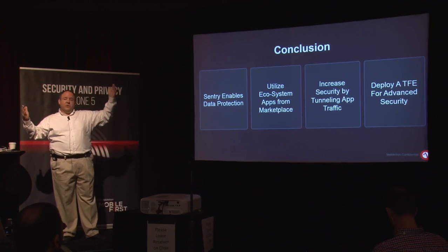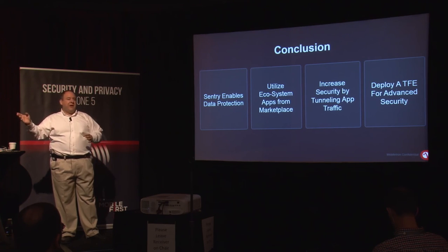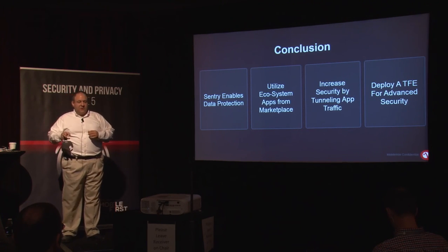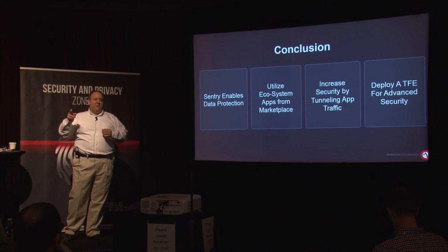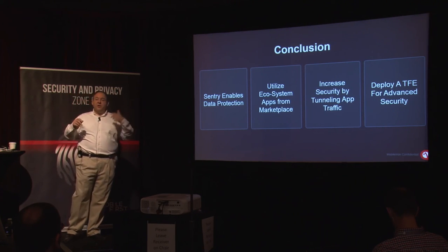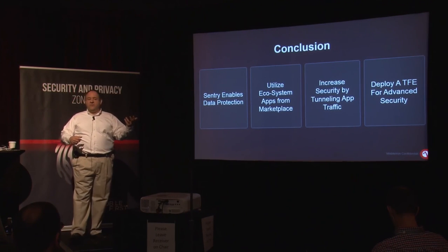So you define what you want success to look like, and then you put every milestone and task going backwards along with a duration. So you know that if your first mission is to prevent unregistered devices from enrolling into MobileIron, that's a milestone, that's success. Define when you can do that. Then you want to stand up another Sentry. MobileIron recommends that you have one Sentry for mail and one for App Connect.